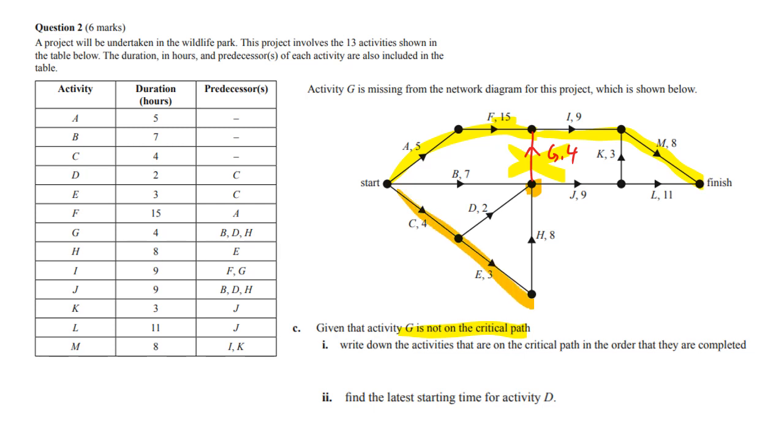So to get to this point, what's the longest path? It looks like that, which is 15, right? And we know you're not going through G. So that's 15, 24, 27, 31. And the 3 and the 8 is just the same as the 11. It looks like it is definitely a winner, just through the old iBrain combo attack of saying it is in fact just A, F, I, M. Put some nice little commas there.